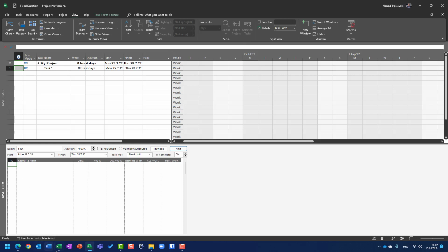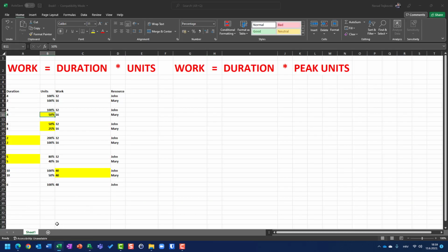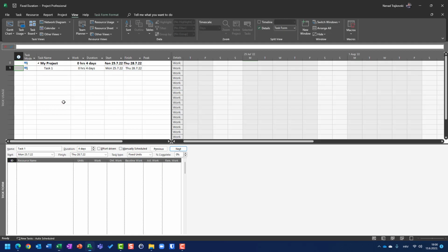Now, let me go through Excel. Here, I will assign John and Mary with 100%, and I will say that John needs to work 32 hours and Mary 16. So before that, when are you going to use the fixed work task type? When you exactly know how many hours each resource is supposed to work on.